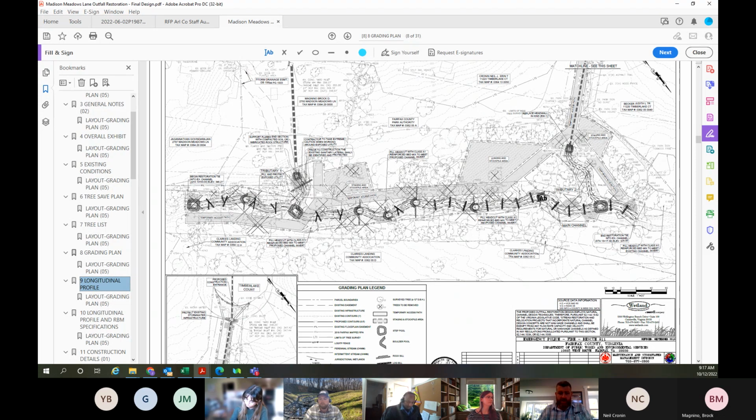But when we're done with the project, we have a really extensive native replanting plan. I don't have the exact numbers, but I think it's in the neighborhood of 1,500 trees and shrubs we're going back in with. Does that sound right, Irene? Yeah, it does. And the replanting will be mostly 1-gallon container plants. This is more of a reforestation project and not really a landscape project, so the smaller container plants don't require watering, because it's not really feasible to be going out and watering 1,500 trees on a regular basis.